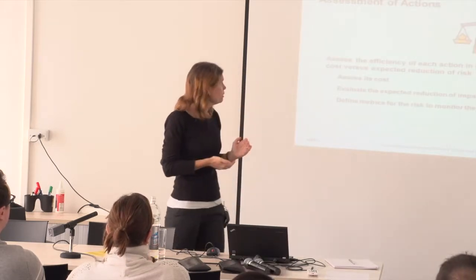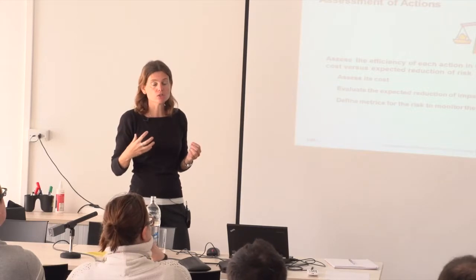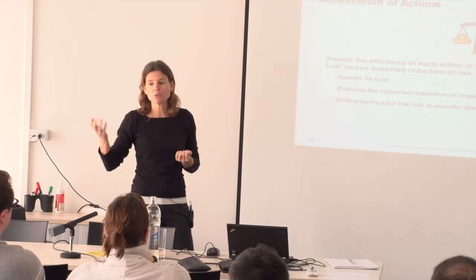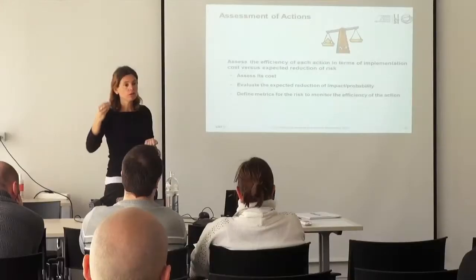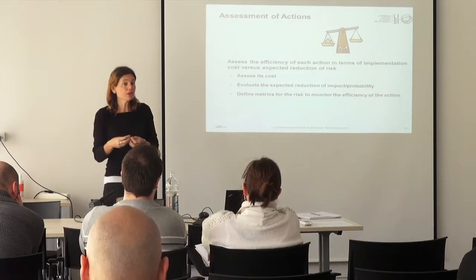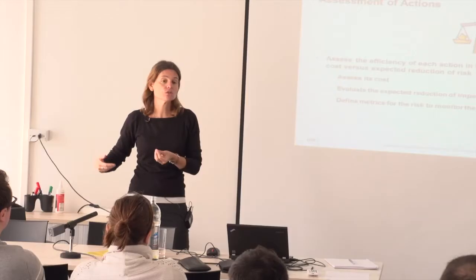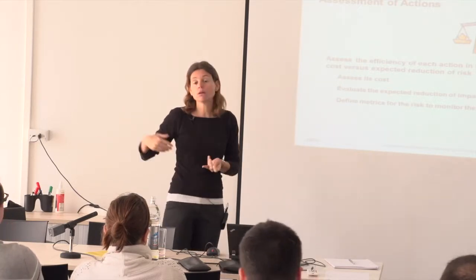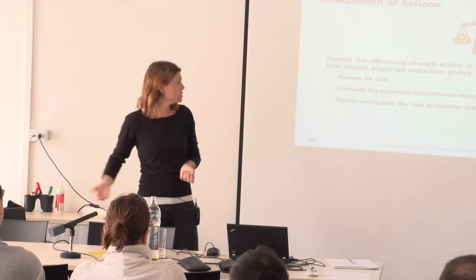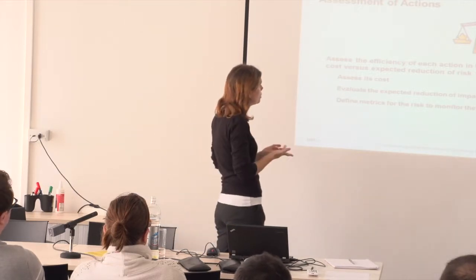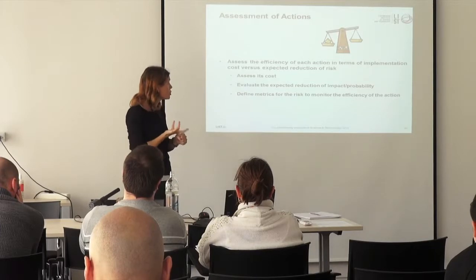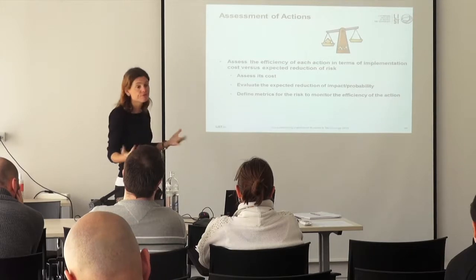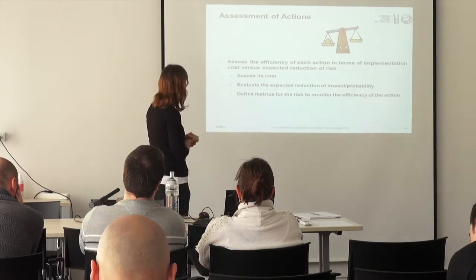Okay, so as we said, at the end, with the actions, there's always this question of whether I want to invest that much effort, money, and time in these actions if I know that they are not going to be sufficient to reduce the risk, or they are going to cost more than whatever we are going to pay if that risk occurs. So assess the cost, evaluate the reduction that you expect from that action, and define whether it's sufficient or not.